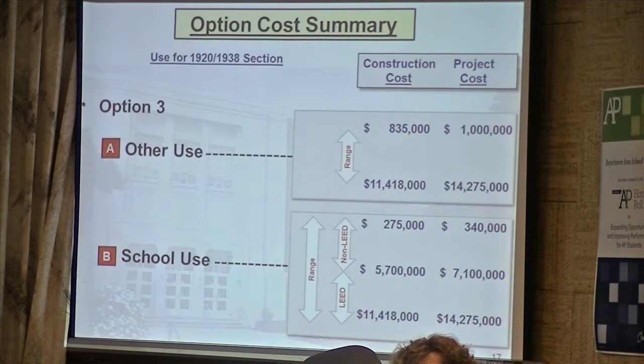So you're gonna have this constant, ongoing investment in the building year after year if you go with the low end. If you go with the higher end on the project, you're doing a comprehensive project, and then you're investing in that building over the long term. So that's a 20-year fix at the higher end. Okay. What you're saying is, we're investing in the maintenance in advance if we go with a high-end project. Correct. If we don't, then maintenance is gonna sneak up on us.